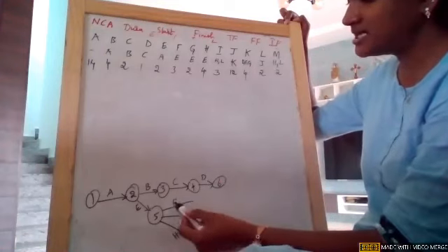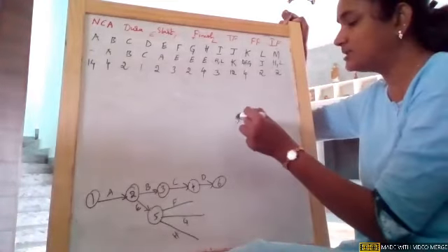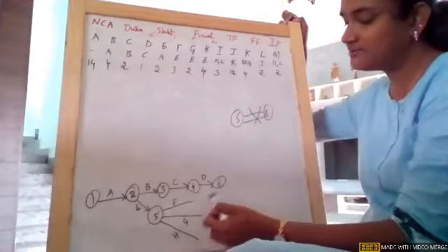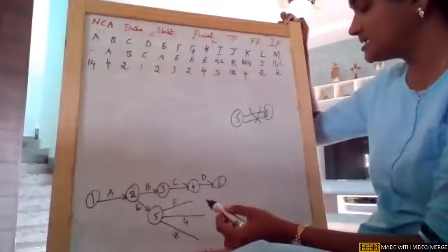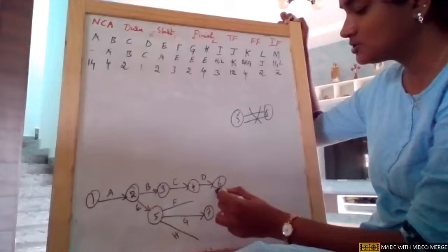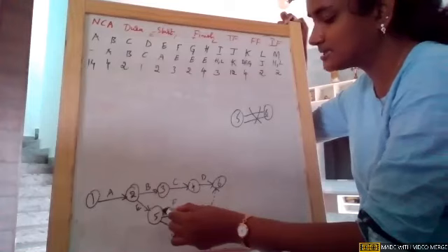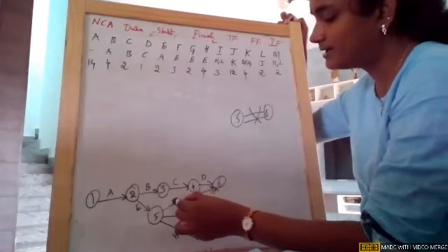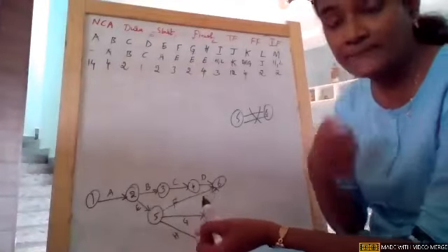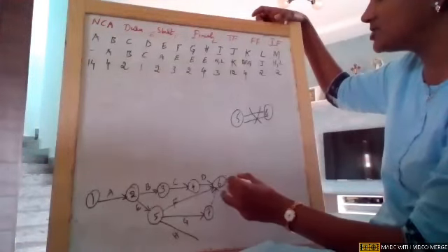Now if you see, F and G are becoming parallel activities, girls. You all know already that from the same node, we must avoid this kind of situation. So F and G, if I draw, it will be the same. So in order to avoid such a situation, I'm just introducing a dummy for G. So G will be acting as the dummy, and F directly comes from node 5 to 6. And D, F, G are giving rise to K.